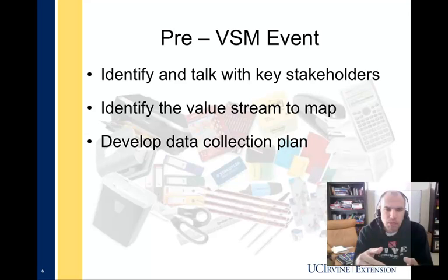So we're looking at a minimum cycle time. How long does it take to do each step? But other key metrics that we would be looking for are how many people are doing the process, what percentage of rework is taking place in the process, what percent of the time does product or service flow through that step in the process perfectly. If it's a mechanical process, we're shifting or changing over from one product to another. How long does it take us to switch from one product type to another product type? So there's a myriad of data that we can collect, but at a minimum we want to know the process